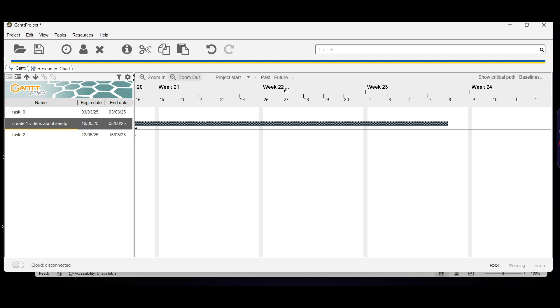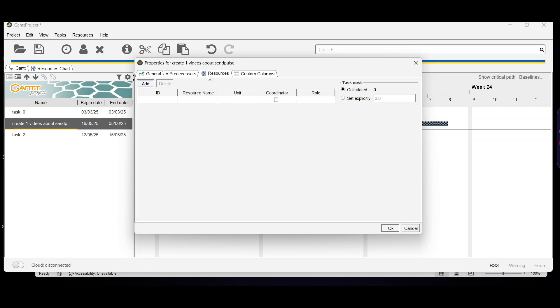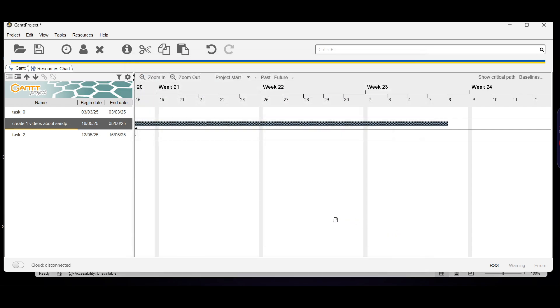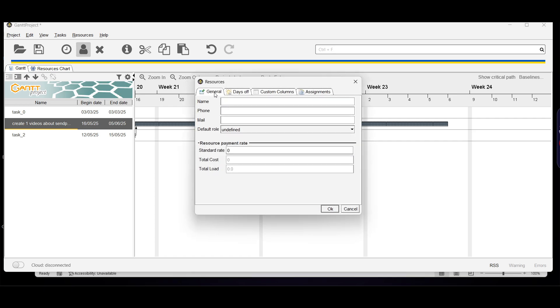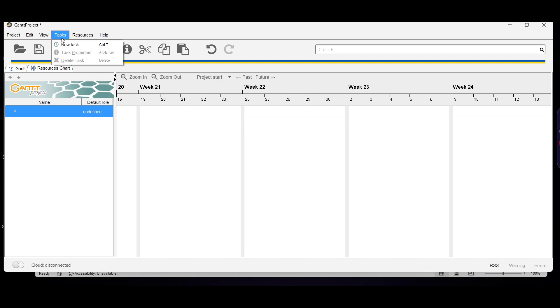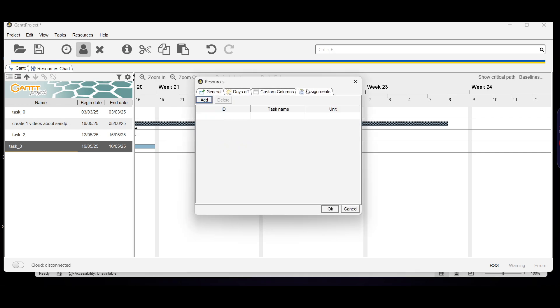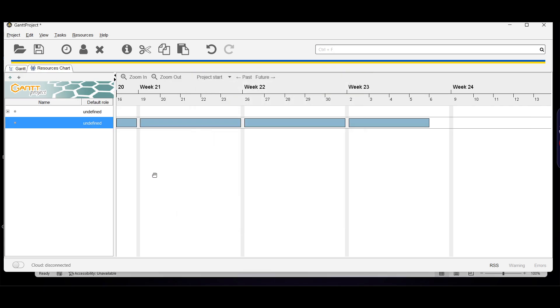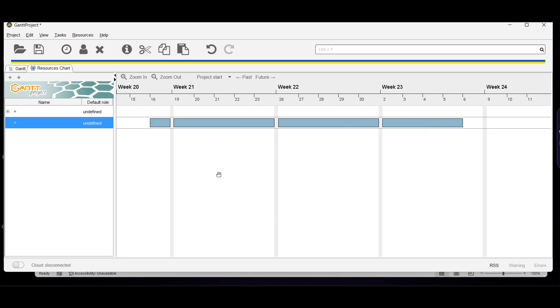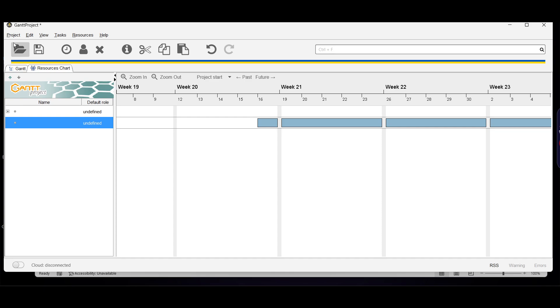Assign resources to ensure tasks are allocated to the right people or team. Click on resources and select the person or team you want to assign the project to. Adjust resource allocation to avoid overloading team members. Customize your Gantt chart to visualize your project timeline and share it with stakeholders. To add resources, click this icon, write your phone number and details, click okay, and add the assignment type. Select the task, click okay, and I can assign it to a specific person like XYZ. It will automatically be defined and show which day they're working on.